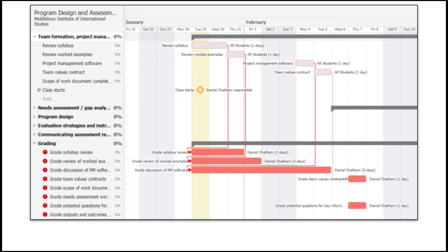This is another example of a Gantt chart. And in this case, the red lines that connect things from the upper part of the page to the lower part of the page, these are dependent relationships. This is what I mentioned earlier about you can show the critical path of things that must happen before something else can begin. So we see that several of these things on the upper portion of the page must be completed before the phases in the bottom part of the page can begin.